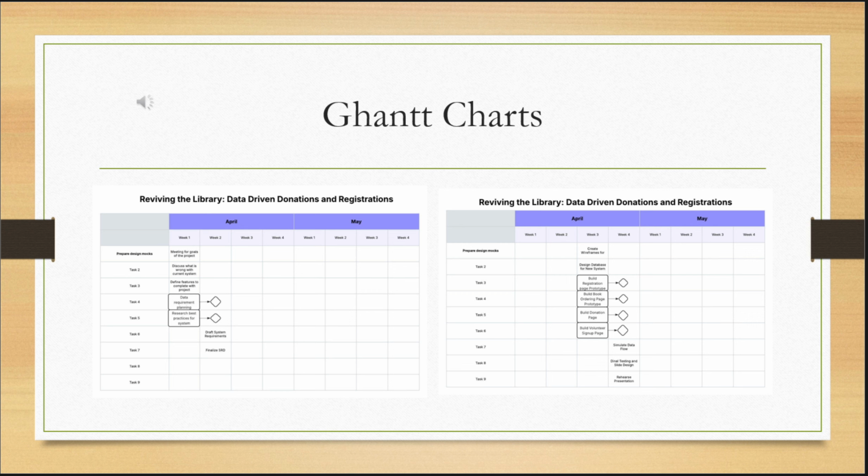This slide visualizes our team's Gantt chart. This Gantt chart outlines our 4-week project timeline. Weeks 1 and 2 focused on planning, research, and creating the system requirements document. Weeks 3 and 4 were used to design wireframes, build a prototype, and run basic testing. Our final deliverables include the demo screens and this presentation to show how the system works and supports the library's goals.